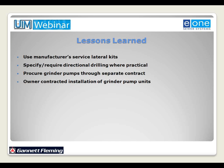So I would emphasize that again: if you can add the cost to your project and have the grinder pumps installed for the customer, and then simply have the customer make the gravity sewer connection from the house to the grinder pump, you'll be well ahead of the game.